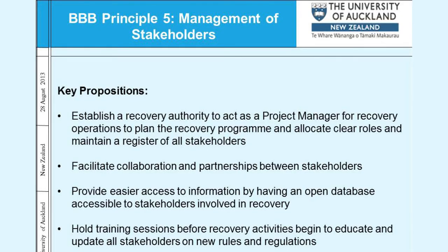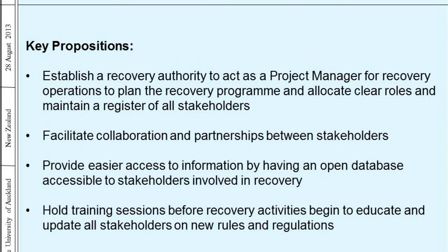And also we can establish temporary retail and workspaces for businesses so that they can start up as soon as possible. Next, management of stakeholders. Post-disaster recovery is a unique environment where we have so many different stakeholders all working together, and this often creates very chaotic and ad hoc operations. So it's really important to establish a separate recovery authority that can act as a project manager for recovery operations. This recovery authority should be responsible for planning, implementing and monitoring the recovery program, and also to maintain a register of all stakeholders, and allocate clear roles to everyone so everyone knows what they're doing.